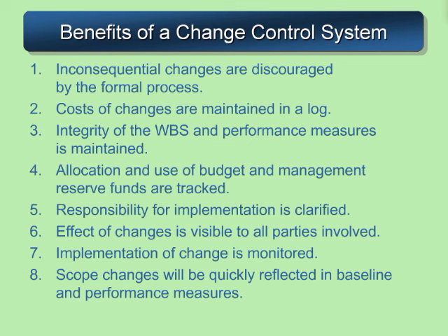We can identify who's going to implement that change and let everyone affected by it know what's going on. We monitor the change, and from that we can see that any changes to scope can be reflected in the baseline and performance measures, so that we're being measured accurately against the project in its current state and not the project as it was originally thought out before these changes took place.